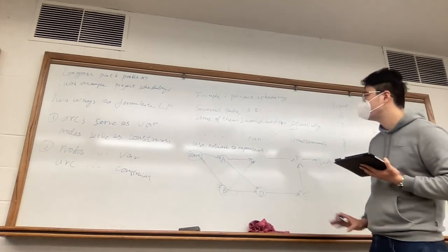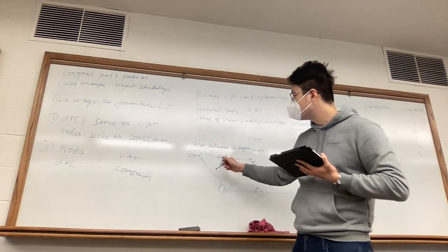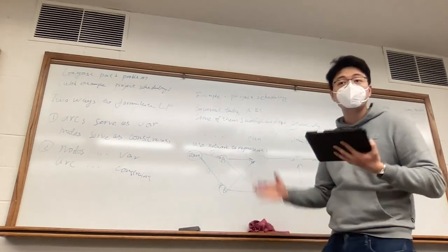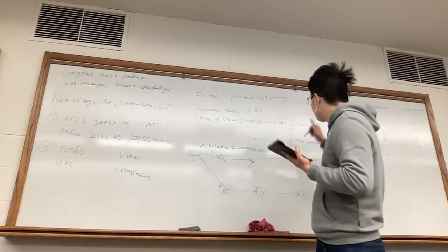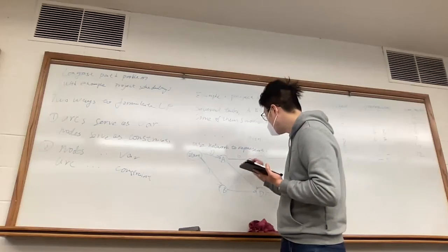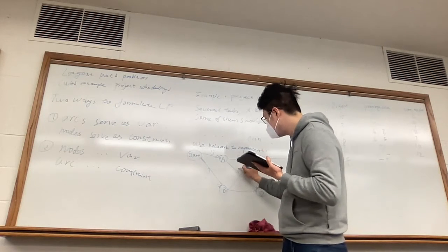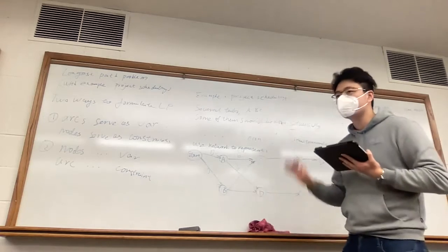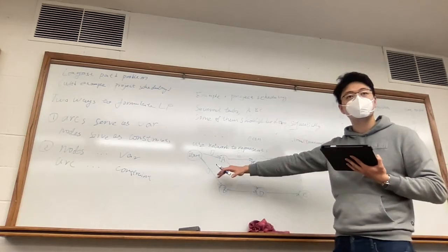This is our graph, and we know that from start to A, you have no cost. You can just start with A and B directly, right? But for project A, you need 6 hours to complete it. So let's say from A to C, and from A to D, 6. The weight of the arc in this network means the cost that you need to complete this task.